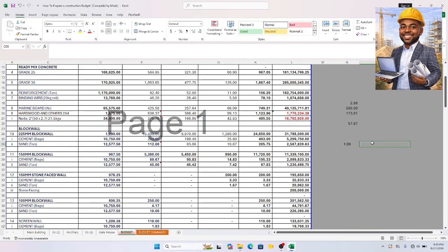All right. If I want to find the cement, I can do it just the same way we did the one we did at the top. Now the sand, that means this sand will be 6/7 times 1.54 times density of sand.